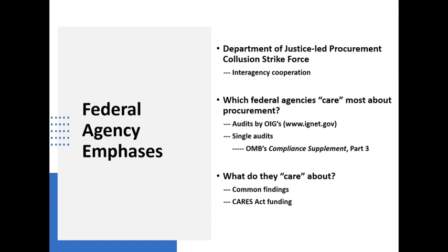And one of the other protective things that can be done as well is to say that you have the authority to waive technicalities and to place a contract that's in the best interest of your organization. Those are both kind of protective things that it makes sense to put into the solicitation.